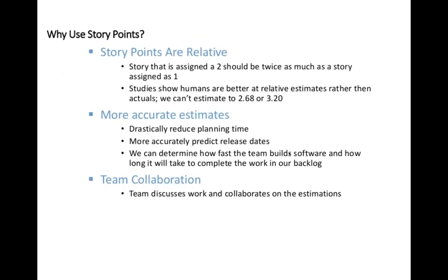So why are story points needed? Story points are relative. A story that is assigned a two should be twice as much as a story assigned a one. Whenever we are comparing two user stories, they are relatively compared.